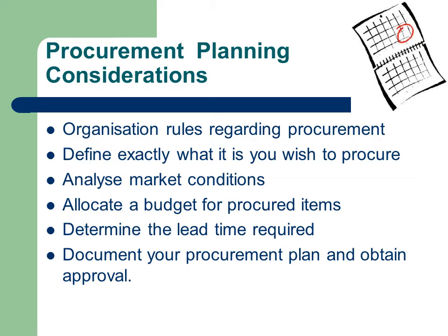It may be prudent to add some contingency for cases where the cost is not clear-cut. Often pricing can be driven by supply and demand. For example, if you require contractors with skills that are currently in great demand by the mining industry, which pays very well, you may also have to pay more in order to attract them to your company. And finally, determine the lead time you will need to select the supplier and also the lead time for delivery of the goods and services. You'll need to factor this into your project schedule.